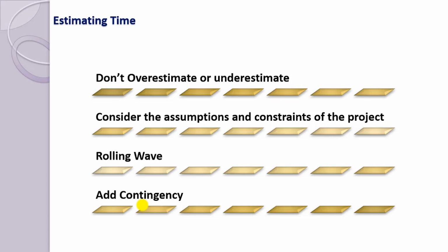So whenever we communicate the plan, we communicate the dates. There are certain things you keep to yourself and certain things you present to your customer, that is, your stakeholders. Talking again about contingency, we could choose to add contingency to every milestone and deliverable, giving an extra day, or we can add a certain percentage at the end of the estimate. I want you to analyze how you have done it for your project.